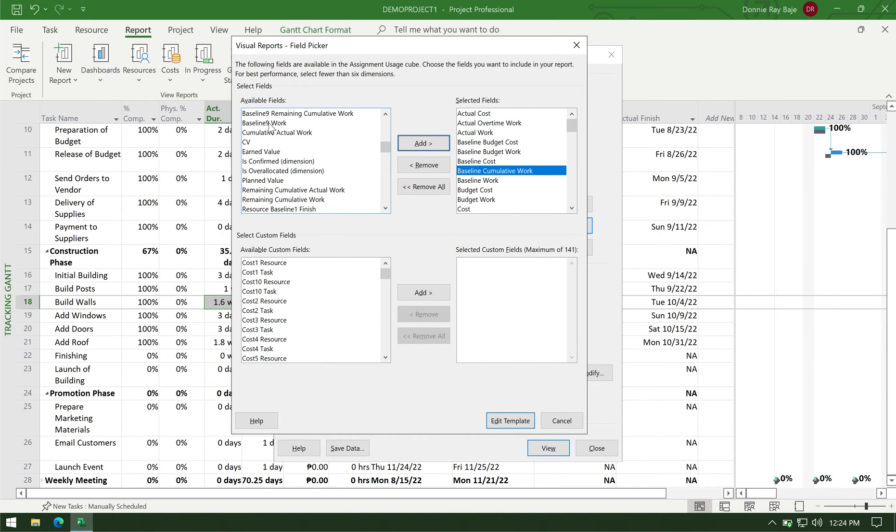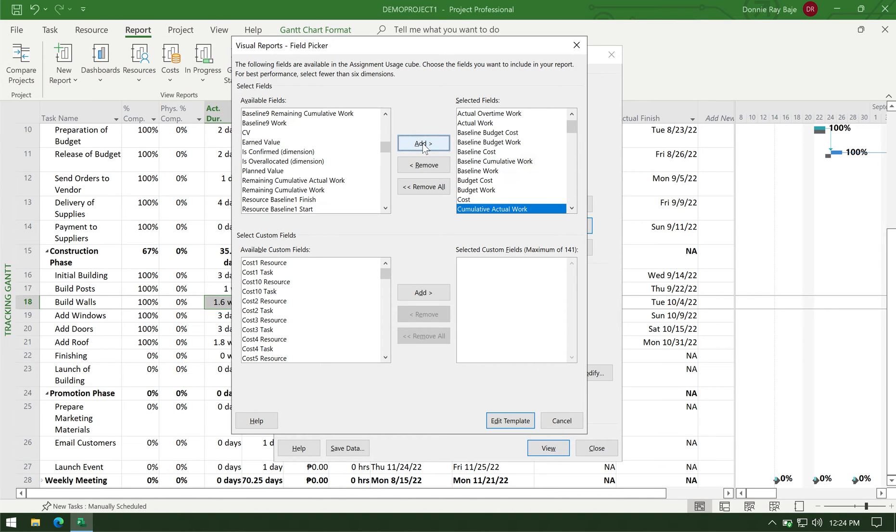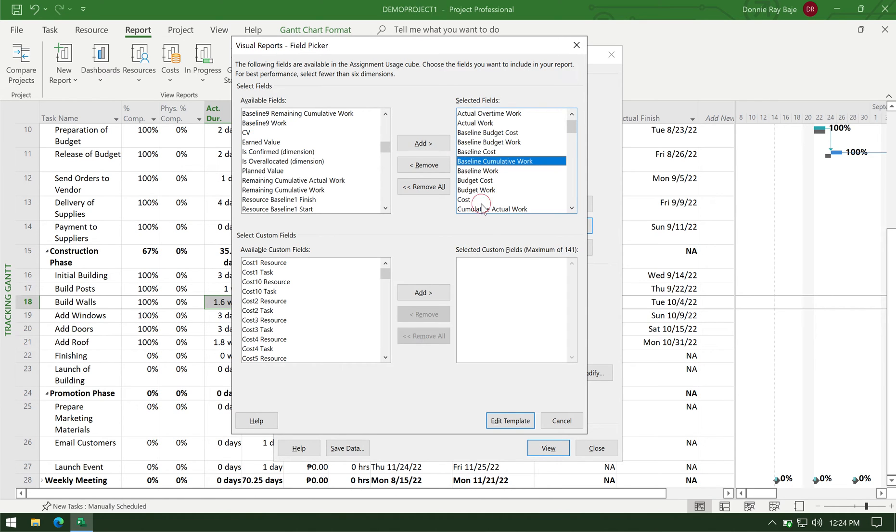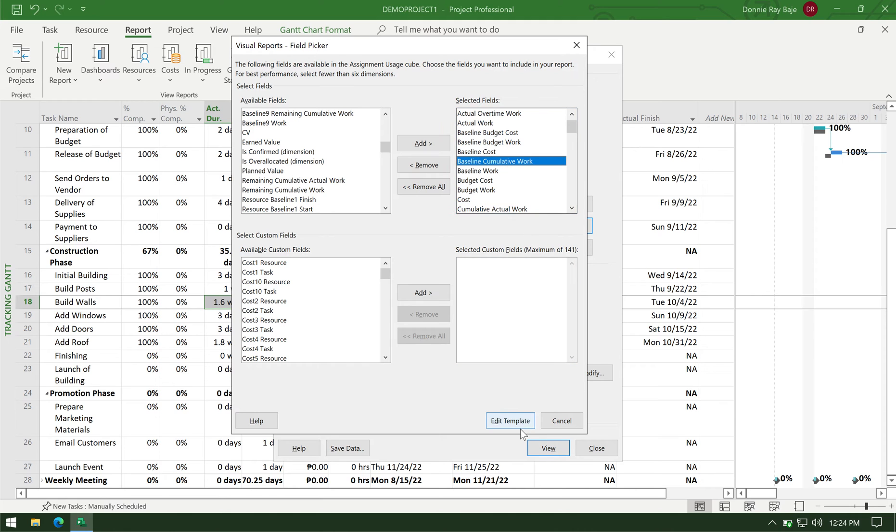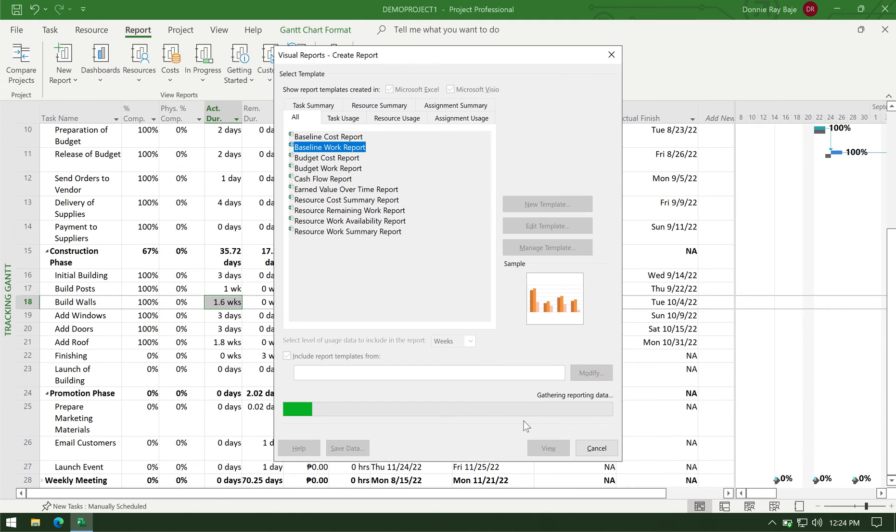So you know that an S-curve is technically a report that shows the accumulated work, accumulated cost, etc. So you need cumulative data to be added in the report. And then click edit template in that pop-up.